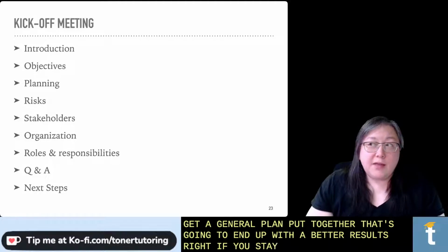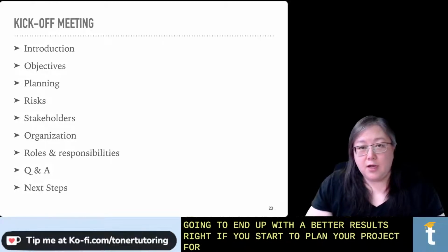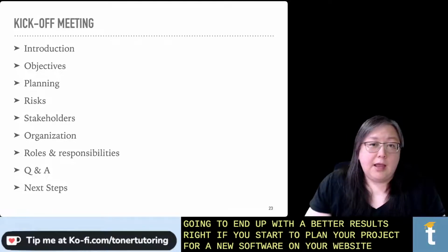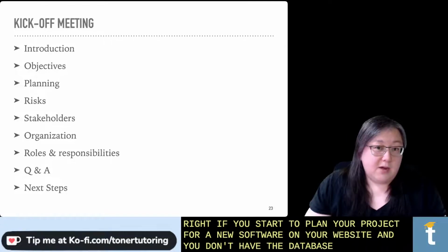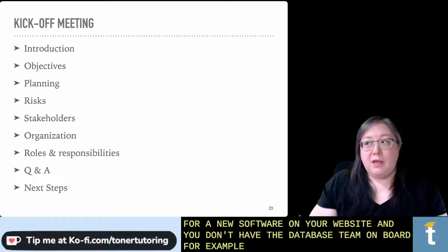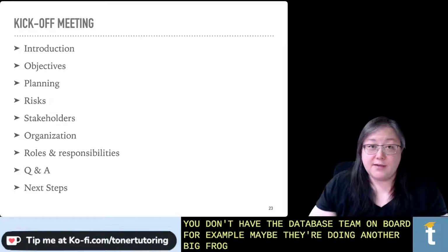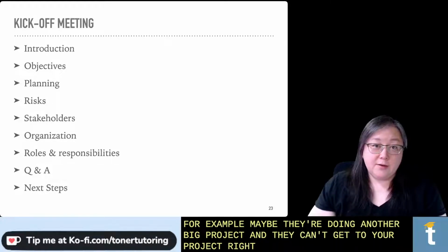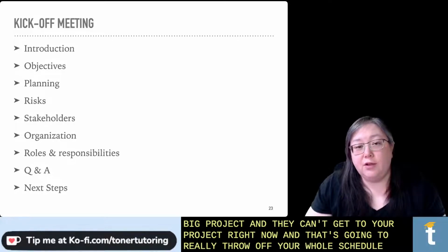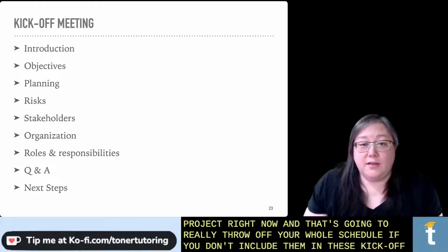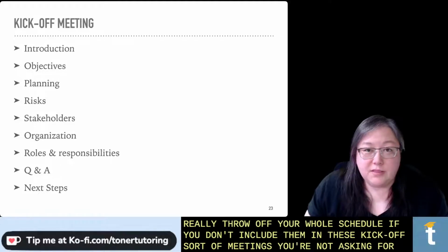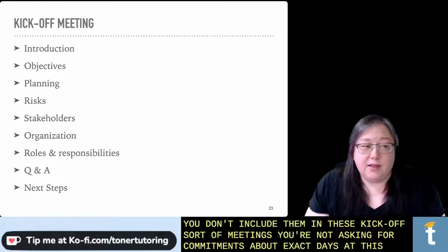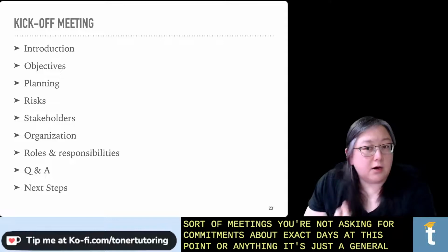If you start to plan your project for a new software, a new website, and you don't have the database team on board, for example, maybe they're doing another big project and they can't get to your project right now, that's going to really throw off your whole schedule if you don't include them in these kickoff meetings. You're not asking for commitments about exact days at this point or anything. It's just a general starting point.